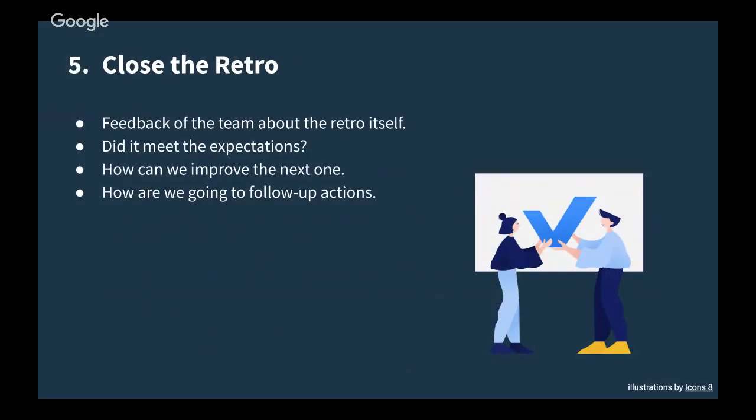And finally, when you have found the problems, discussed the causes of those problems, and decided what actions to take, you are okay to close the retro. For that, there are some important parts that you need to do. The first one here is the last one in the list: you're going to discuss how we are going to do the follow-up of the actions that we decided to take.